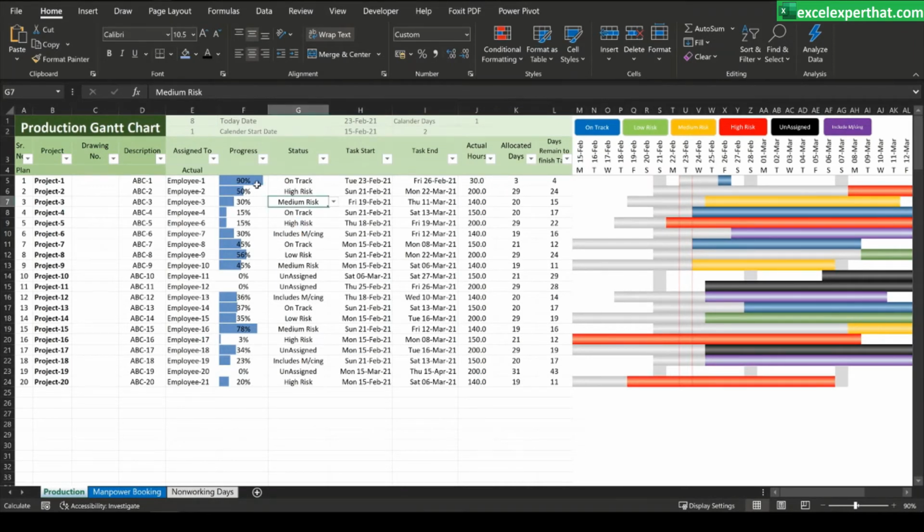Now you can see we have updated the formula, but still that particular row is not highlighted or dimmed, because we haven't completed our progress to 100%. Once you put this progress to 100%, the entire Gantt row will get dimmed. Still, there is one problem. Your area of task is showing with the same color which we are utilizing for the completed task.